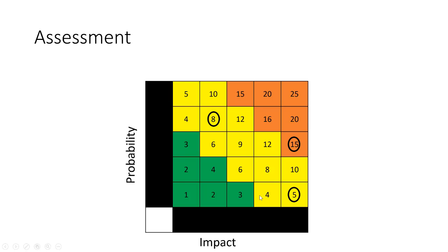So you can then look on this kind of a chart where you look at probability as this axis and impact as the horizontal axis, and identify where your risks fall. The first 2 are okay, they're in the yellow range, but this one here of the vendor not using an agile approach and late coming requirements being a problem, that's a big deal, right? It's a bigger deal, at least, than something that shows up in the yellow or the green zones. So there you are, talking about